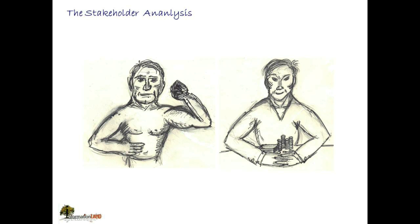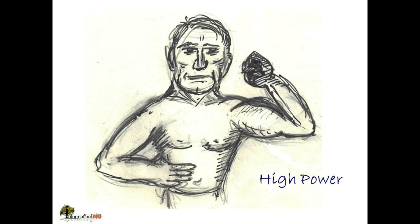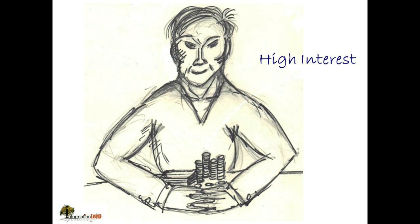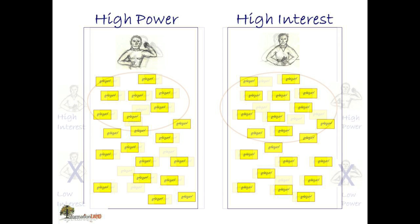We can go a step further and do a straight stakeholder analysis. Who are these stakeholders? We look at two sorts: they either have a lot of power — so they're extremely important in what they can do — or they have a high interest to do things. Sometimes these come together and sometimes not. We make a short list of those with high power and those with high interest. The ones placed highest on these sheets with our post-its score highest, and the ones at the bottom score lowest.